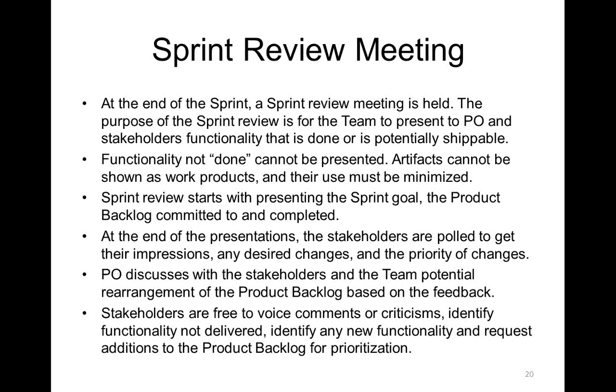What I didn't mention earlier is that the product backlog, which has all the requirements, has stories in it, but each story is not supposed to be complete without the acceptance criteria associated with it. So the product owner also gives the acceptance criteria for each story or requirement, that if you fulfill this requirement, it should be meeting these criteria.